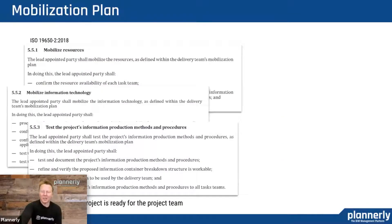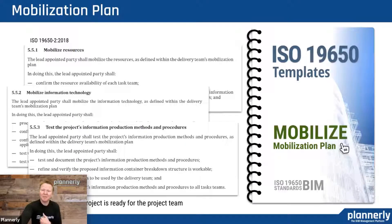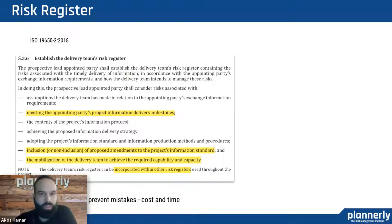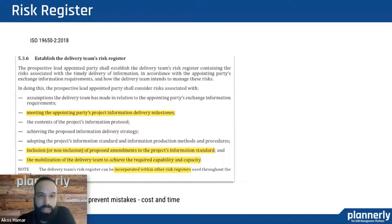When we start a project, there's a concept of testing and being able to make sure the project is essentially ready for the project team. We have checklists inside Plannerly to verify that requirements are met — checking whether the CDE is up and running and whether the workflows are good. If something can go wrong, it will. In the risk register, we can be prepared and document some of the risks we might have to encounter and set mitigation measures.